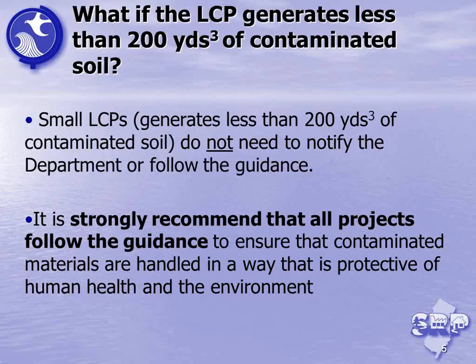Next. So what if there's a linear construction project that does not generate 200 cubic yards of contaminated soil? Well, numerous small projects go on all the time, like when you see guys in the middle of an intersection doing work on a utility line or something. They don't generate 200 cubic yards. This volume was put in there to weed out those short-duration construction projects or maintenance projects.